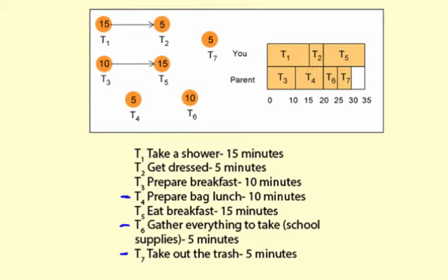So what ends up happening here is your parent ends up doing all the independent tasks, tasks 4, 6, and 7, and then you do tasks 1, 2, and 5. So probably a good way to think about this is do your critical path first, and then you can fill in and sometimes rearrange items that are independent in order to make your schedule overall take less time.